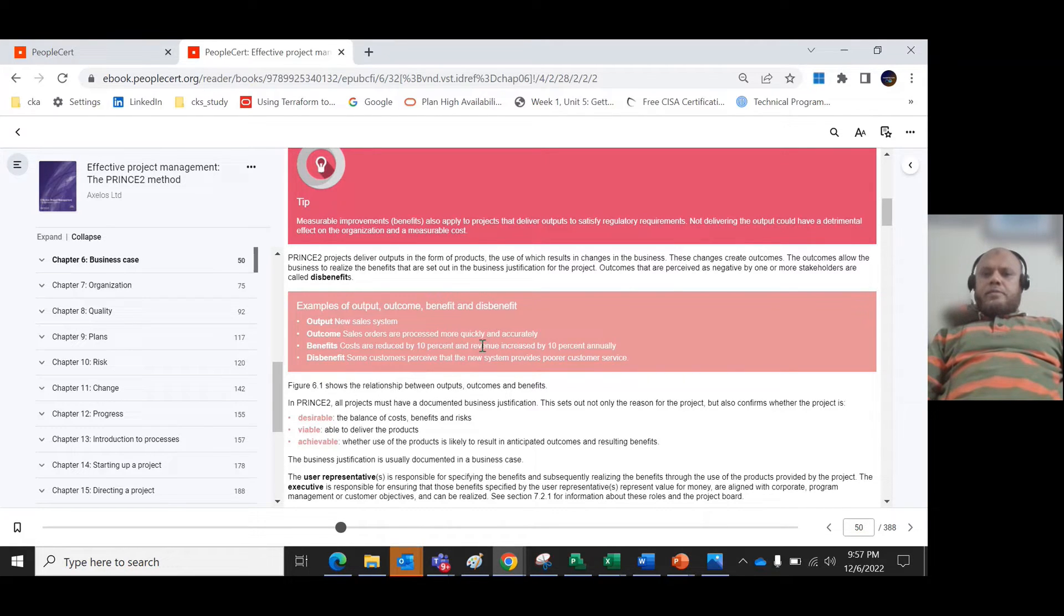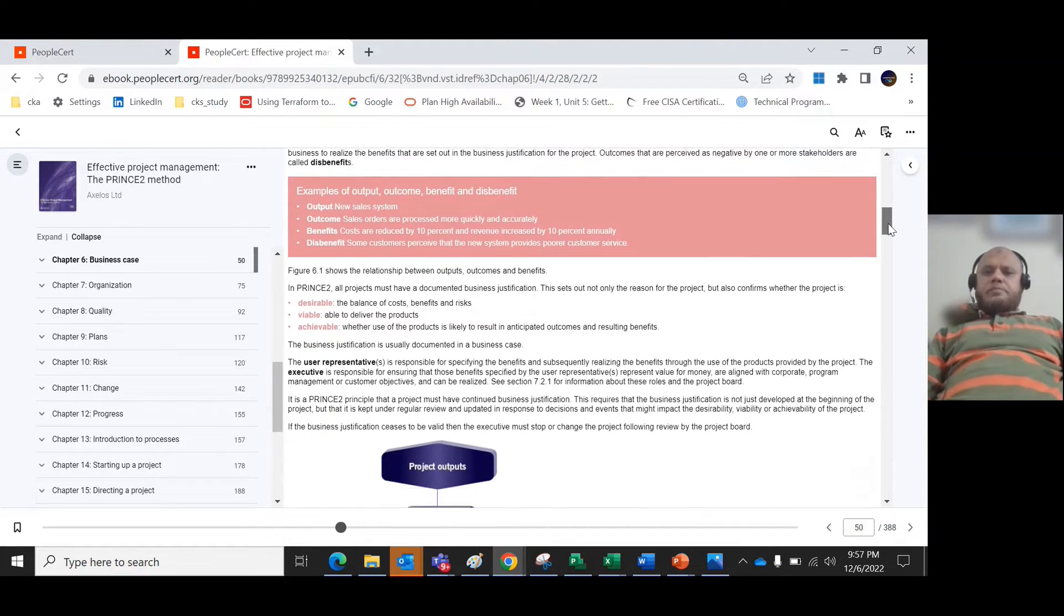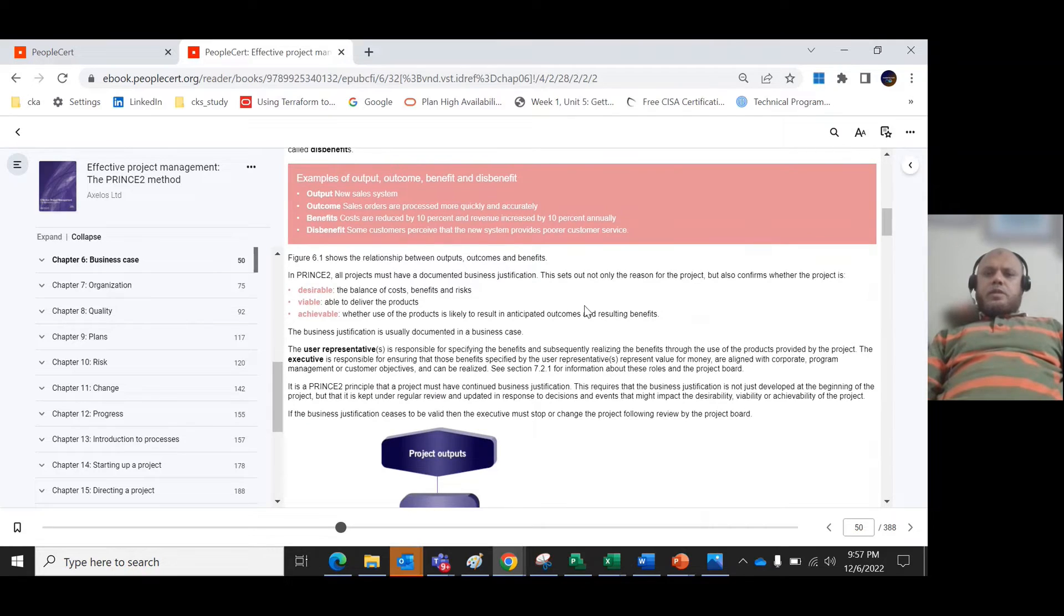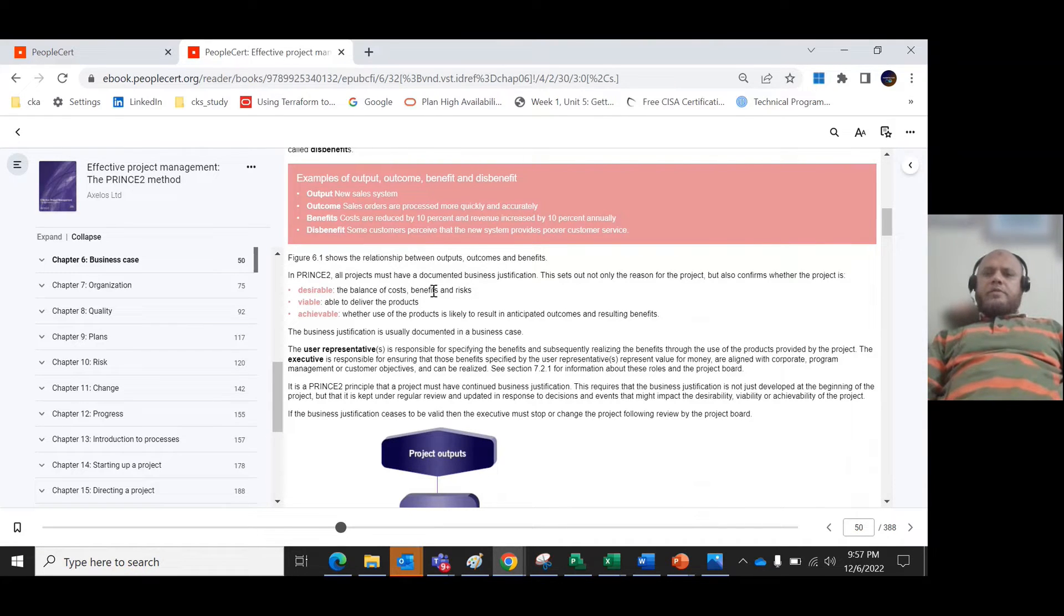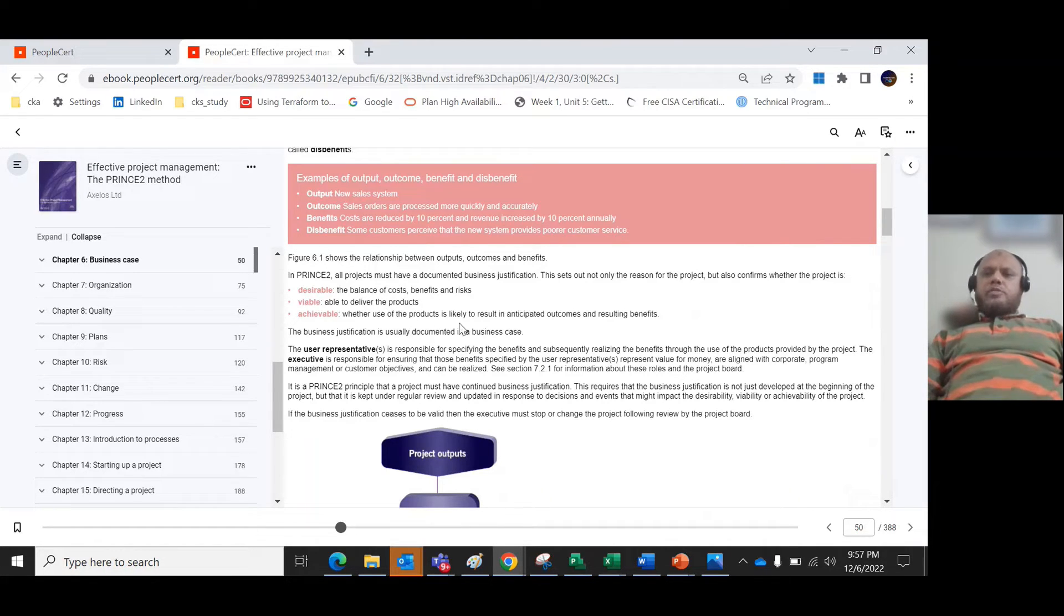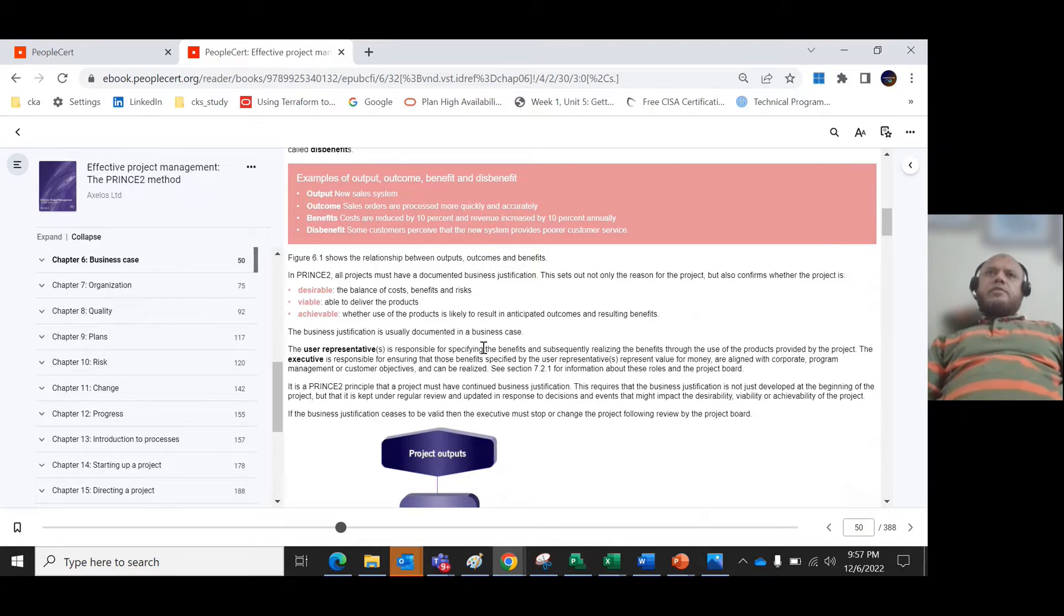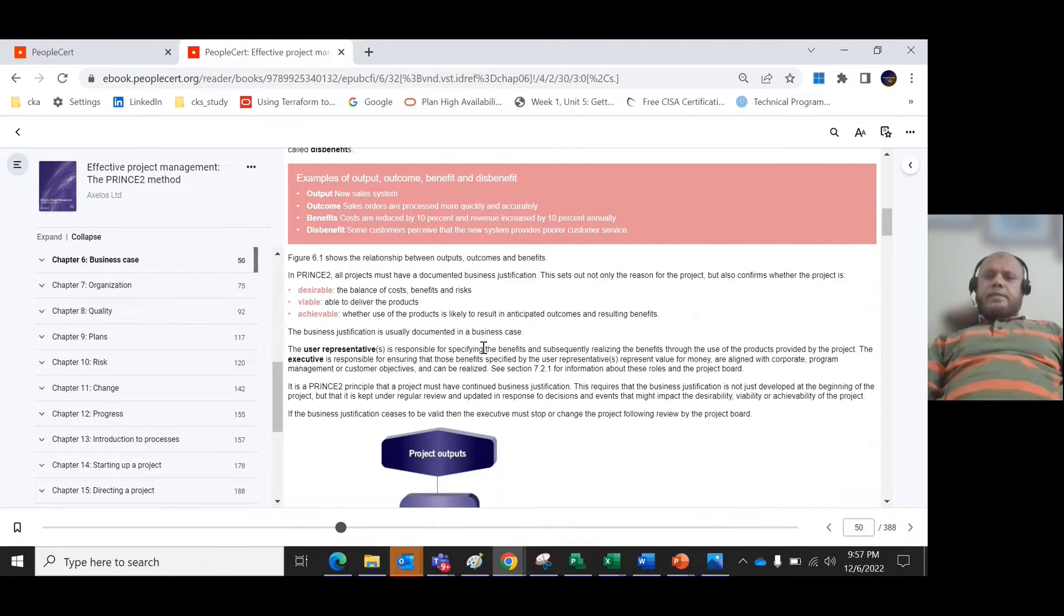With this example we understand the relationship between outputs, outcome and benefits. Desirable means the balance of cost, benefits and risk. Viable means being able to deliver the products. Achievable means whether the products are likely to result in outcomes and resulting benefits. These business justifications you can maintain in the business case.